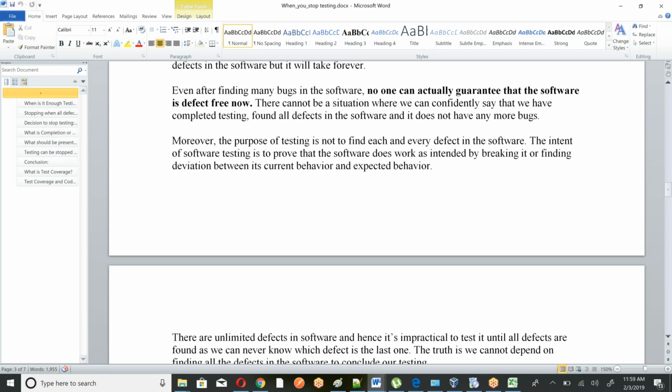Something like that, and then you put in more effort. And always remember, when you estimate, always estimate 130%, not the actual 100%. Take 30% more. If a user story actually takes 10 hours, make it 13 hours. That is the goal. That way is better, because sometimes you need to retest, sometimes you need to go somewhere, so don't make it tight. Otherwise you commit to something you could not deliver, and that is not a good sign. Speak up before.